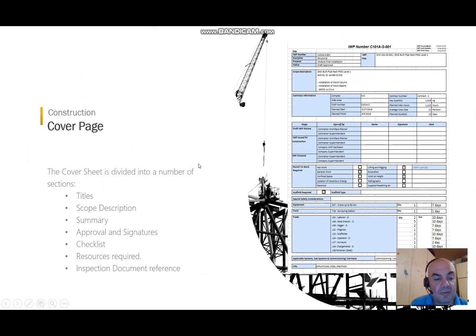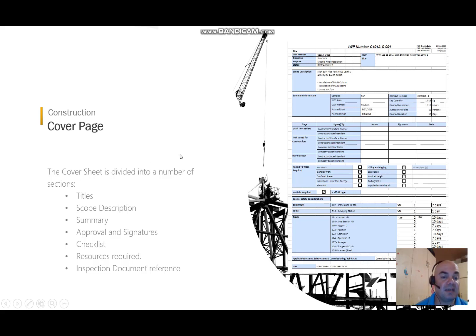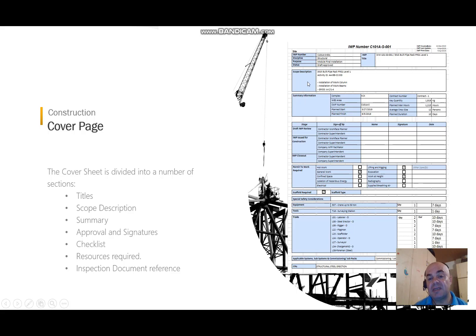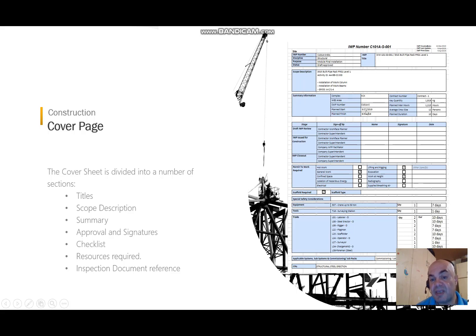The Installation Work Package is made of many sections. We start with the cover page, where we can see titles like the IWP number and description, the purpose, and the scope description. Some key figures in the summary include quantities, demand hours, and the average crew size.